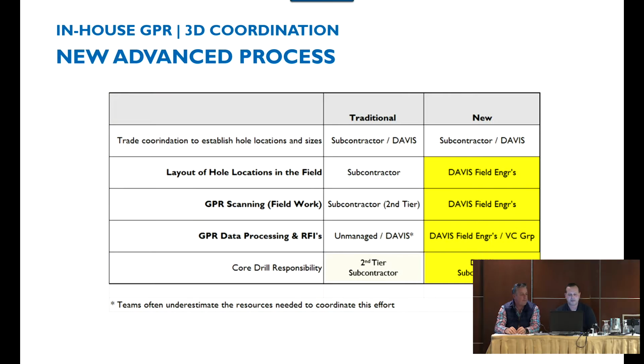So traditionally, laying out the core locations in the field, the plumber used to do that. The GPR scanning was done by somebody else. The GPR data processing and the RFIs, the plumber would send that to Davis. And then the core drilling would be another trade.